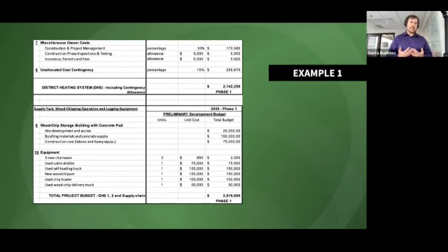So there's chainsaws, and it depends on how far you need to go into the value chain. There's usually a local sawmill or a struggling forester that is really eager to partner to fulfill at least the forestry side. A lot of communities still need to create at least the storage shed and platform to collect wood chips and to have a yard to do seasoning. It's always recommended to get a wood chipper, and to have a wood chip truck and trailer so you can deliver wood chips at a bare minimum. And we outline some of those costs here and factor them into the overall cost of the project.